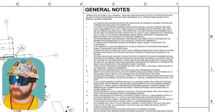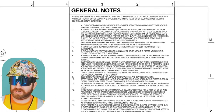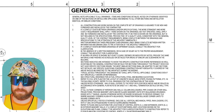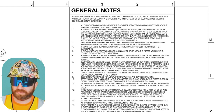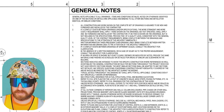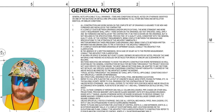Let's read note number three: 'Written information takes precedent over drawing lines. Bring conflicts between written information and drawing lines to the attention of the architect immediately.' Why is this important? If there's a conflict and you follow the wrong instruction by looking at the drawing first and not the written portion, that's a mistake. You have to read these general notes in full because they are applicable to the entire drawing set.